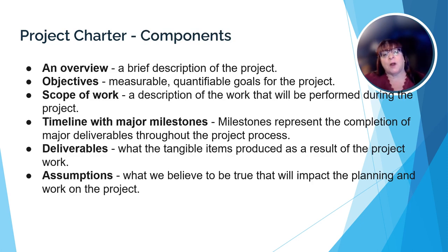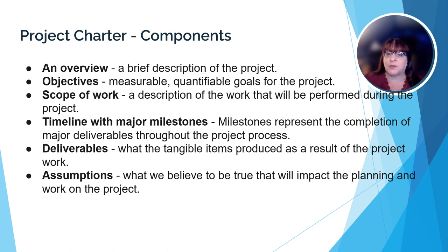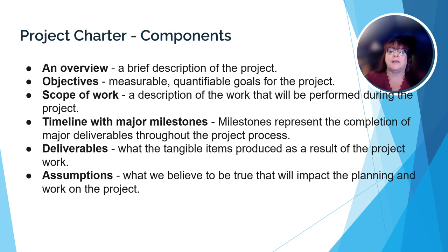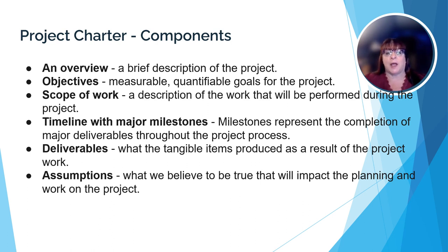The project charter contains everything the project needs to start. A description of the project, what it hopes to accomplish, goals that can be measured to show progress on the project. These goals can be turned into a timeline of milestones, meaning the expected completion of major tasks within the project. The project charter will also state the tangible items that the project will eventually deliver, called deliverables.